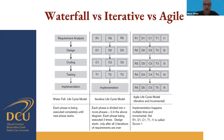If you look at the iterative lifecycle model, you will see phases denoted as R1, D1, C1, T1, then R2, D2, C2, T2 — these are segments or clusters of implementation. In iterative form, there are sequential events within each iteration, but each phase is divided into N sub-phases. In the diagram, each phase is executed three times, and design starts only after the third iteration. This is called the iterative lifecycle model.